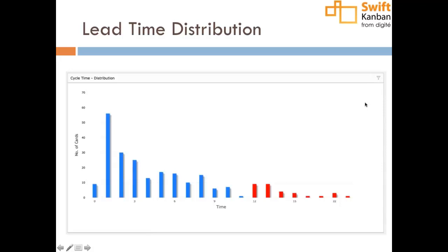The smaller the pieces that flow through any system, the flow becomes more smooth, right? Your cycle time estimates may not change, but the secondary effect on the smoothness of the flow actually does improve. So one shouldn't get very obsessed about card sizing, but let's not let an elephant and a mouse go through the same thing. That's really the case. Absolutely.